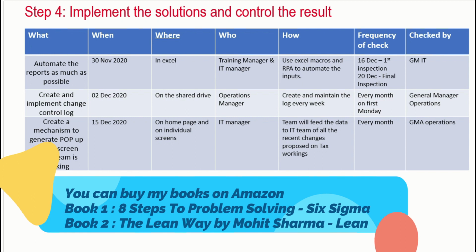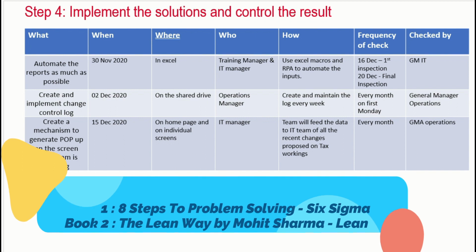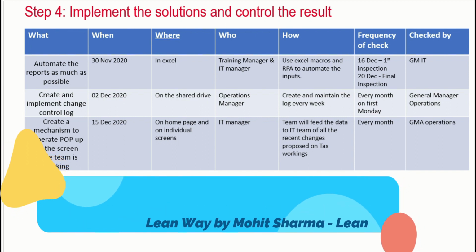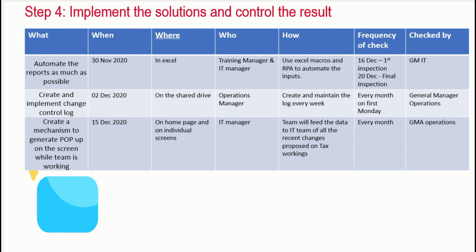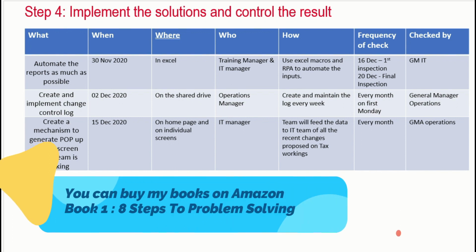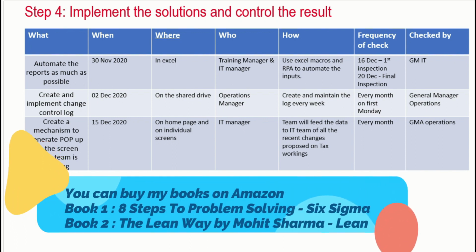The last one was to create a mechanism to generate pop-ups on the screen while the team is working. This was to be finished by 15th of December, and should happen on the home page and on individual computer screens. The IT manager will make this happen. The data of new updates will be given to the IT manager, and then the IT manager will provide these pop-ups on individual screens. The frequency of check by the general manager operations would be every month, to check whether this has been implemented correctly and is happening consistently.